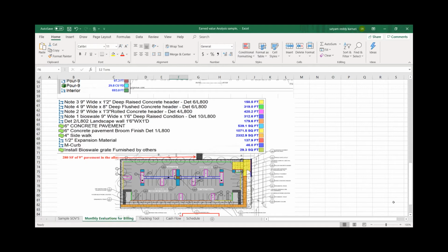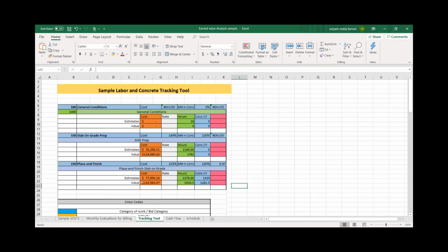If they are deviating anywhere from the initial plan, they know they need to notify me in the office, so I can go see what changed and revise if needed. That actually helped on a bunch of projects so far, where they got field drawings that were never shared with me. So we keep control on it.